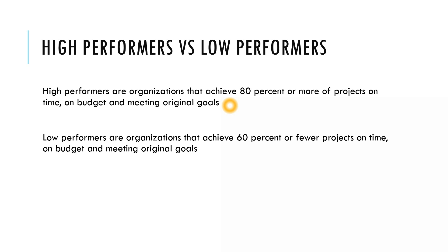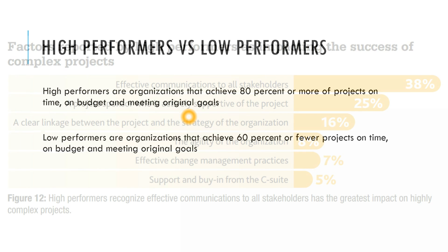Low performers are organizations that achieve 60% or fewer projects on time, on budget, and meeting original goals. So now you can distinguish between a high performing organization and a low performing one. Note that these are definitions specific to this report, not a market-standard definition. We discussed this because these categories are used in the graph listing all the factors.